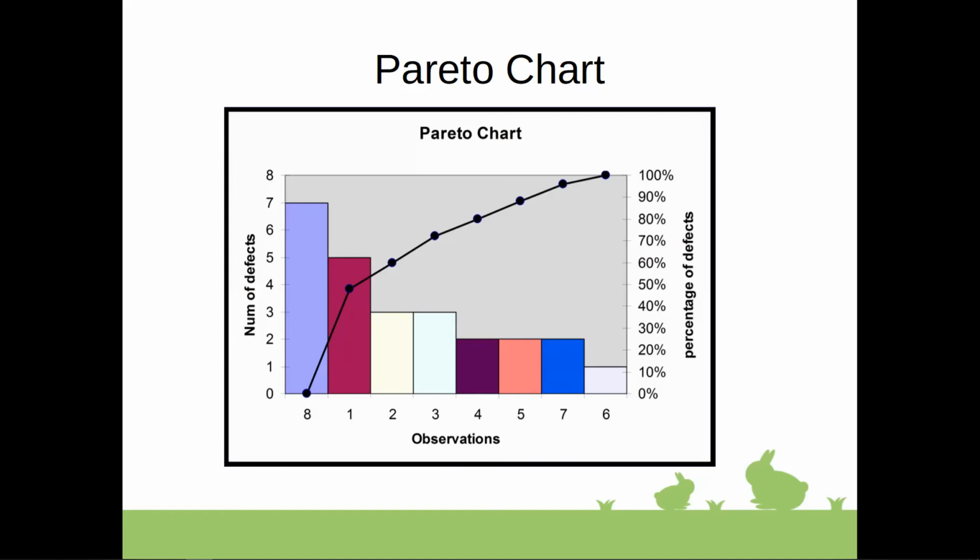First of all, you identify the categories to group the items, the risks. Then you use measurements, how to measure each group of the risks, such as frequency, cost, time, etc. In this example, it shows number of defects.